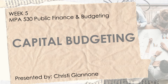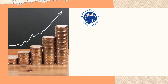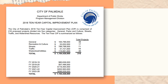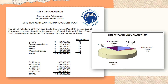Capital projects are improvements or additions to the city's physical assets. For the city of Palmdale, they have a 10-year CIP that starts in 2018 and runs through 2028. The annual update process for the city of Palmdale begins in October of each year and involves city council members, planning commission members, and city staff being asked to provide input on revisions to the current CIP or any new projects that have been identified.